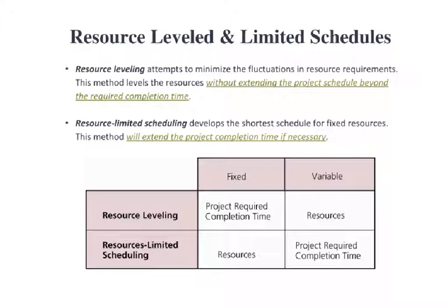In resource limited scheduling, we look at it the other way around. We have limited resources and we can't bring more resources to bear on the project than what we have because we're limited. Therefore, if necessary, we are going to extend the duration of the project in order to be able to do the project within the limited resources that we have.